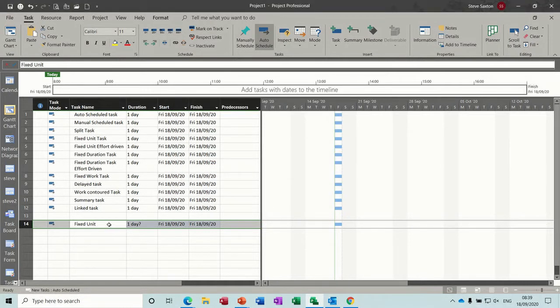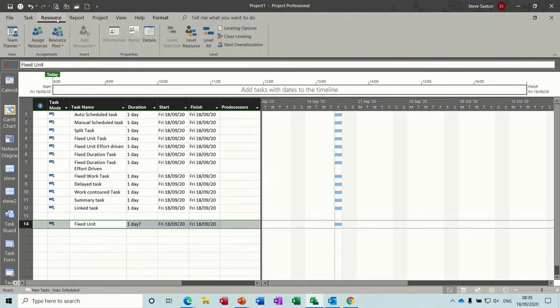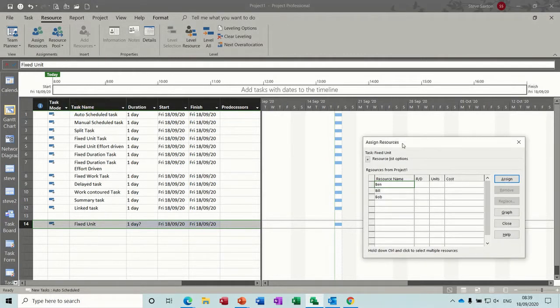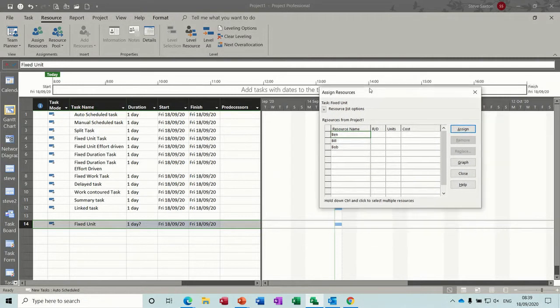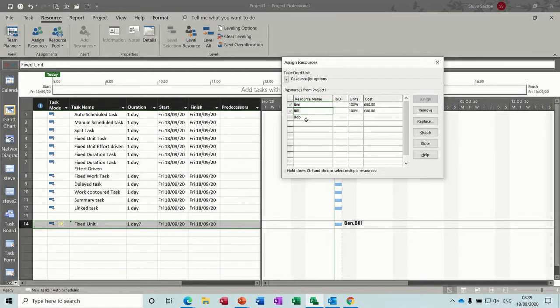Now when you apply resources to this task, this is what will happen. So if I go resource, assign resources, I've got three resources in there. If I assign Ben to that, nothing happens to the duration of that task. Nothing's happened.